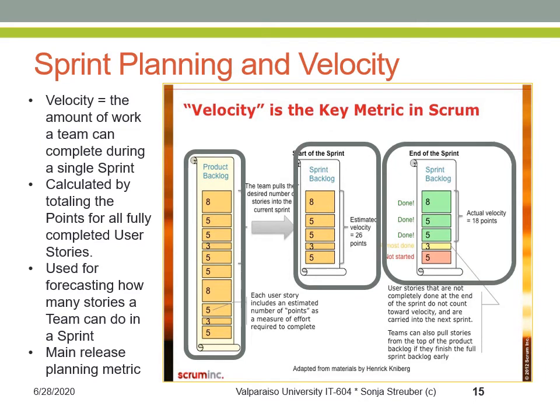So the actual team velocity has decreased from 26 points to 18 points, and the user stories that were not completed, those 8 points, are carried over into the next sprint, for which the team can now plan only 18 points. This also means that any 8 points that were already planned for the next sprint will be pushed out, unless the team really ramps up and finishes the 18 points early and can make up for the otherwise delayed scope. As you can see, sprint planning based on velocity means the pressure to perform is on.